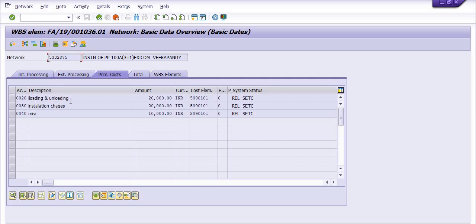Loading and unloading charges are provided by vendor; installation charges are also provided by vendor; and miscellaneous charges include any overhead or borrowing cost. Borrowing cost will be charged in each capital project — that is a separate topic for a different video. Once the services are completed and a bill is provided by the vendor, we create a purchase order for loading and unloading charges and installation charges as per the services planned in this project.